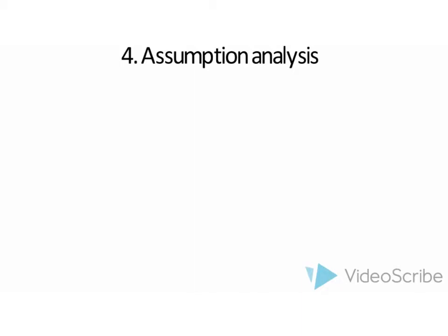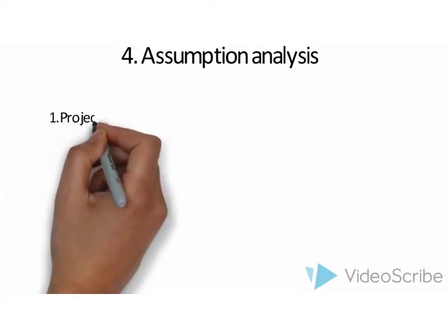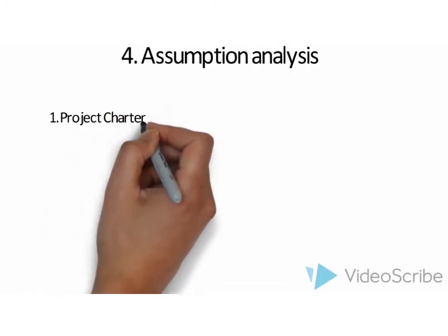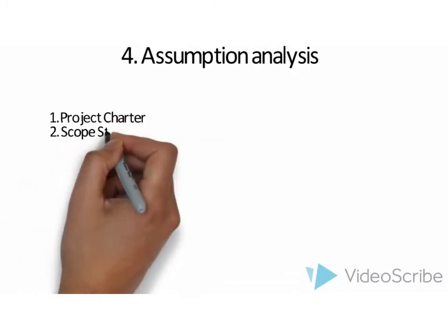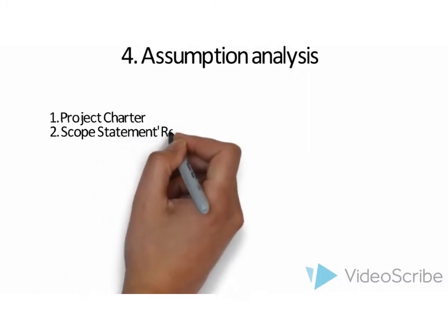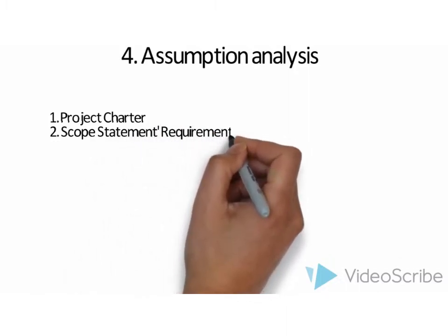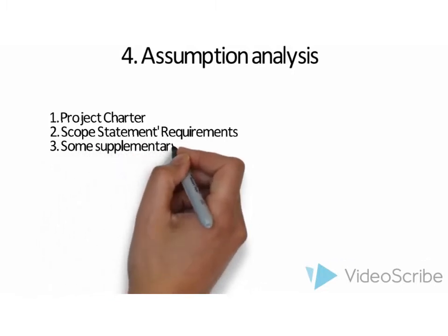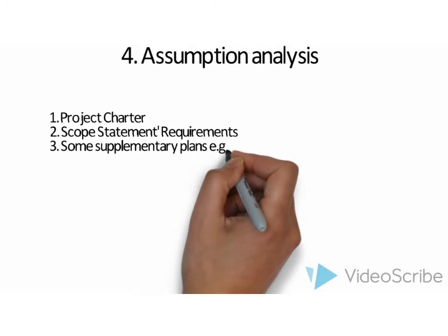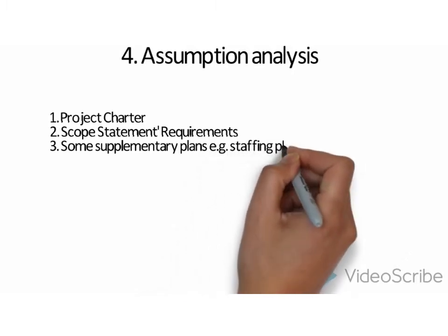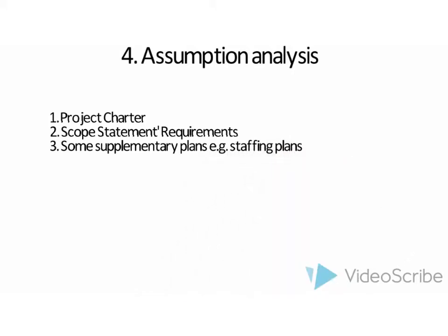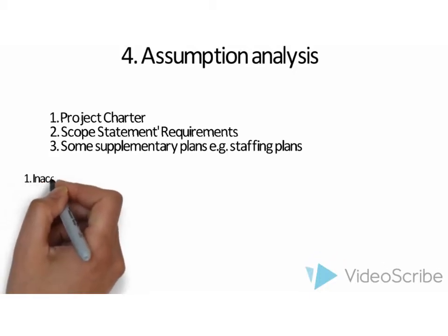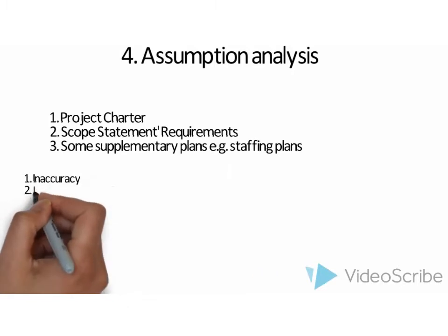Assumptions are documented in following plans: project charter, scope statements requirement, some other plans such as staffing plans. Assumption analysis identify risk to the project from inaccuracy, inconsistency, and incompleteness.